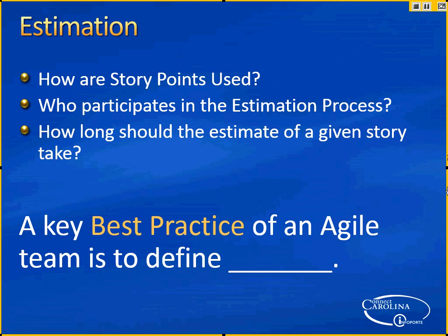And if you're working on any given story, how long should you spend on the estimation of a given story? I'm not looking for an exact number. It wasn't long. Exactly. You should spend no more than a couple of minutes on any one. If you can't get to a consensus, move on, come back, and it might resolve more quickly.